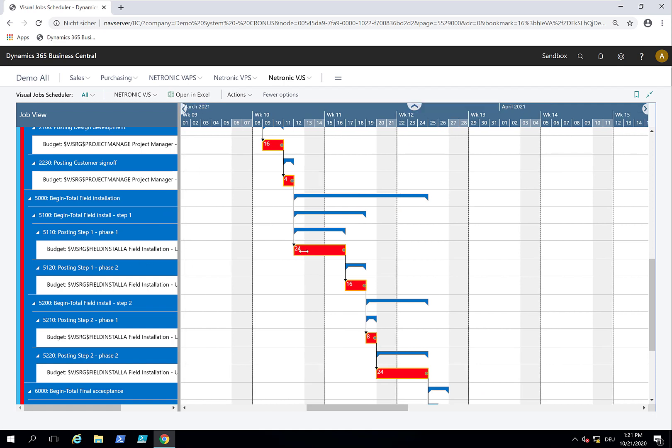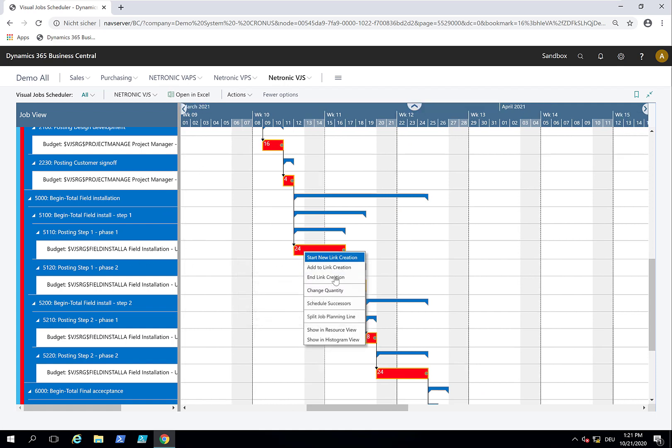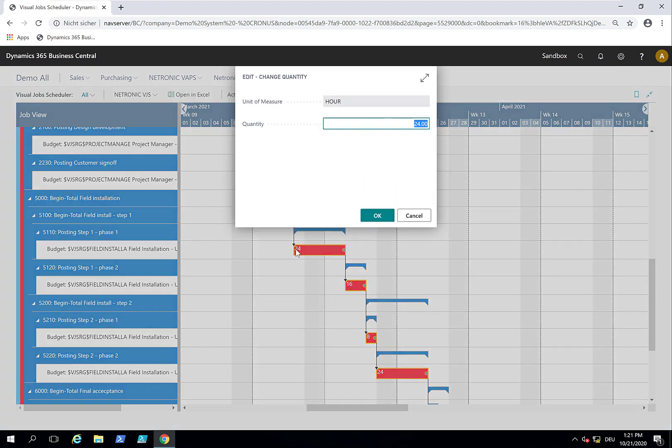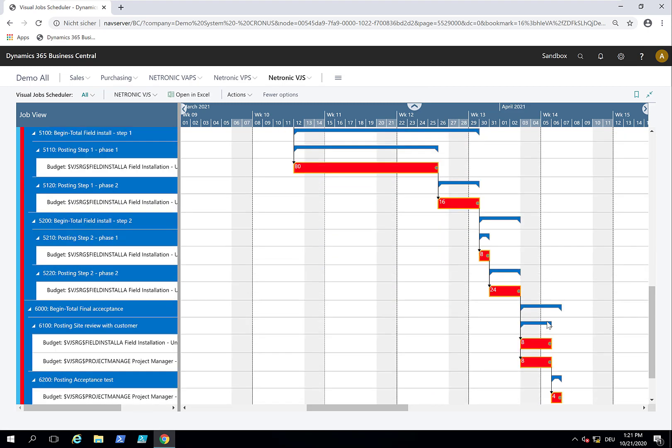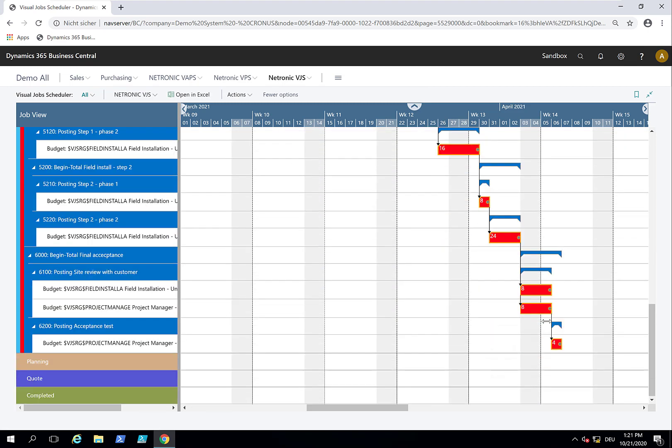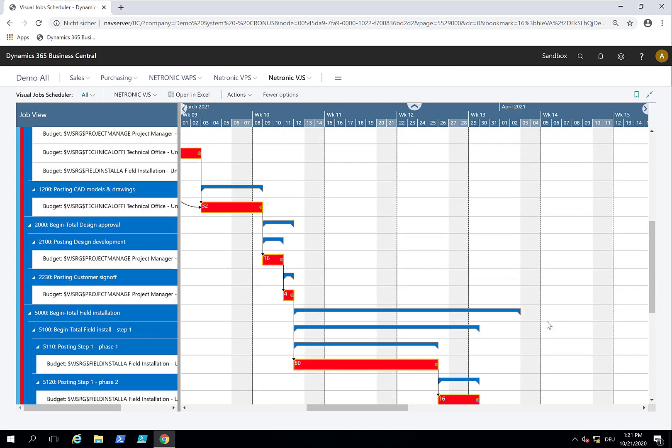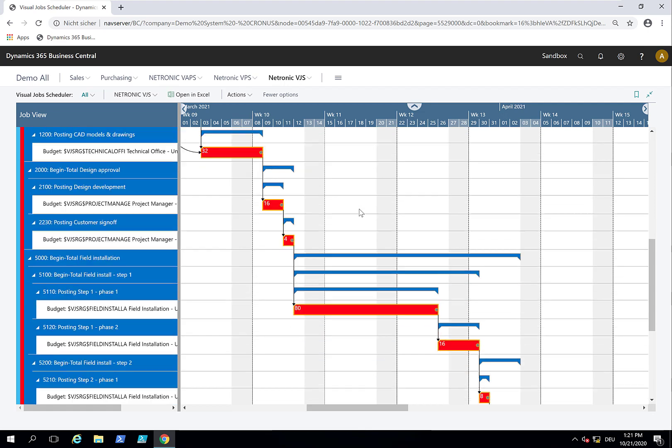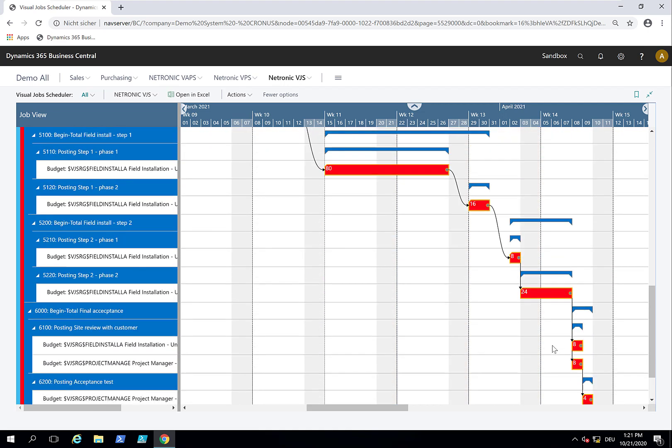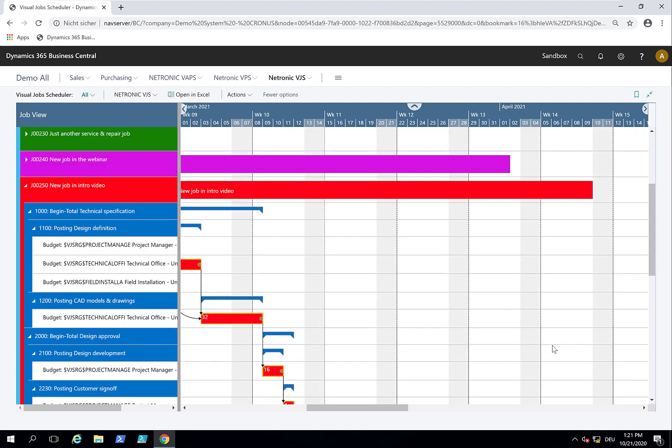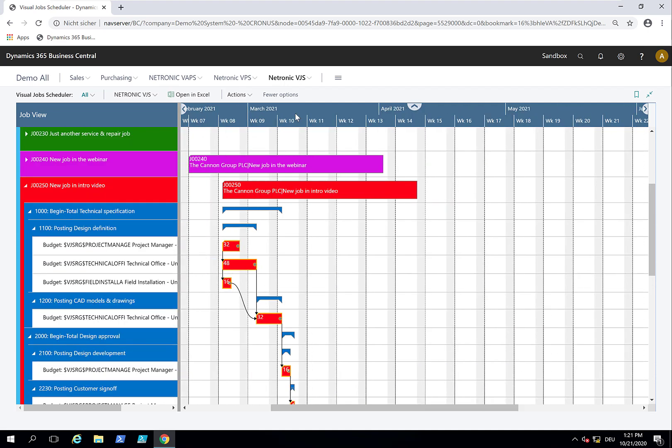Field installation is a big thing. This will be maybe not four days or three days, but let's say two weeks, 80 hours - a really long, complex project. You see this all automatically updates. We can do a lot of time scheduling here. If we don't want this activity to start on a Friday but on Monday, we move this and then the substructure gets moved again accordingly. This is the time scheduling you can do with the VJS.